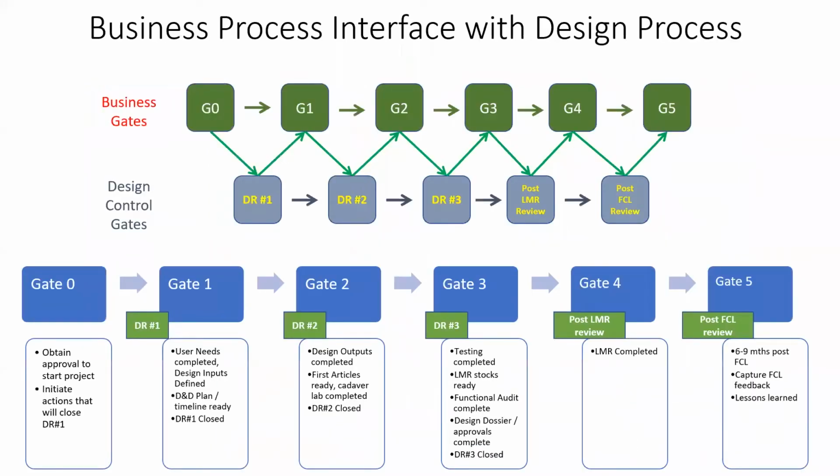There's also a link that the design process has to the business process. Now, this is typical for larger organizations, not so relevant for small startups at this point, but a design review gate could also be connected to a business gate. And a business gate would be business leaders in the organization making decisions on whether to progress further with the design, whether the market estimations are being validated, that yes, there is an appropriate market for the device, yes, we have the funding required, yes, the team is intact and the team is able to deliver to expectations.